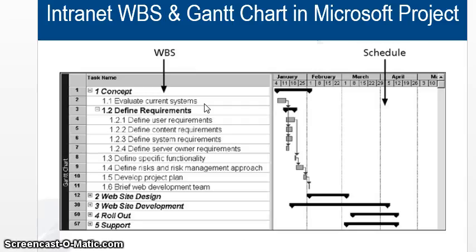Basically, what is work breakdown? See, the whole project is divided into 5 levels: concept, design, development, rollout, support. So maybe this is a company which follows this rule every time, and because it makes them very successful, it makes the project less biased. Yeah. So once you do that, we make the 5 major things. You can break down to smaller chunks, and those smaller chunks are given time, right? So that's where we are very realistic.